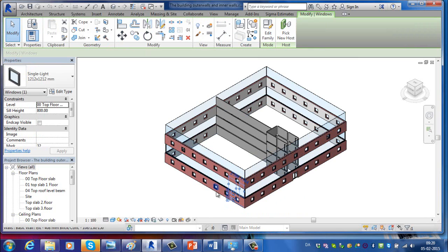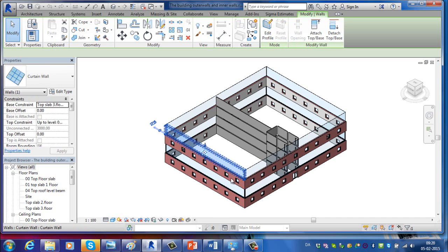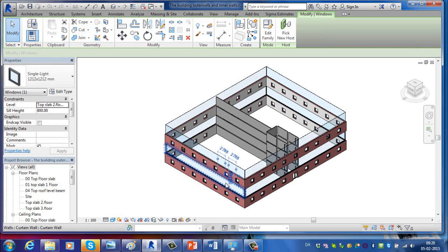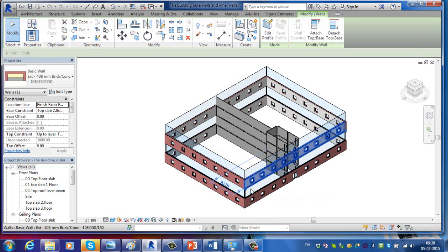So in a way, you can say that the carpentry work and the masonry work are mixed in this one, because the carpenter will probably take care of the curtain walls and the windows, whereas the mason would take care of the brickwork and the elements like this inside the building. So in some cases you have to accept that some hosted elements are within a different works package, as it were. So this is another works package.